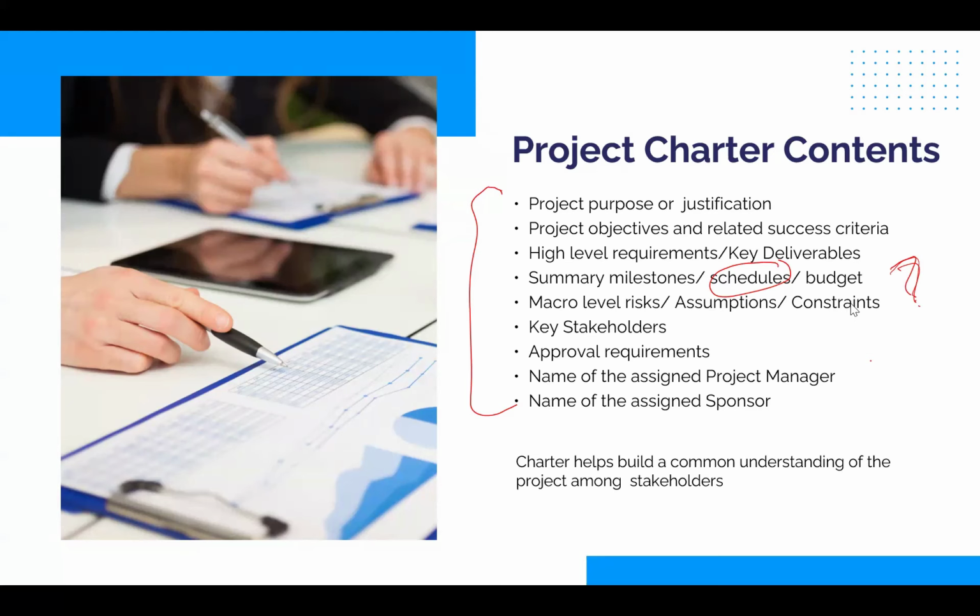But I must tell you something. While charter can be updated, updates to charter are not frequent. Charter would not be affected unless there is a major shift happening in the project. For example, let's say you add one new feature to the product. Your requirement document changes, but not charter. Because in charter, watch, everything is high level. So charter would only be affected when there is a major change happening in the project. Hence, all right. But yeah, schedule can be one major change, right?